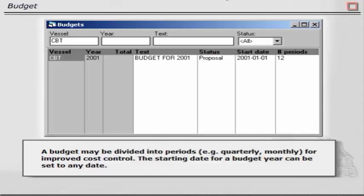A budget may be divided into periods, for example quarterly, monthly, for improved cost control. The starting date for a budget year can be set to any date.